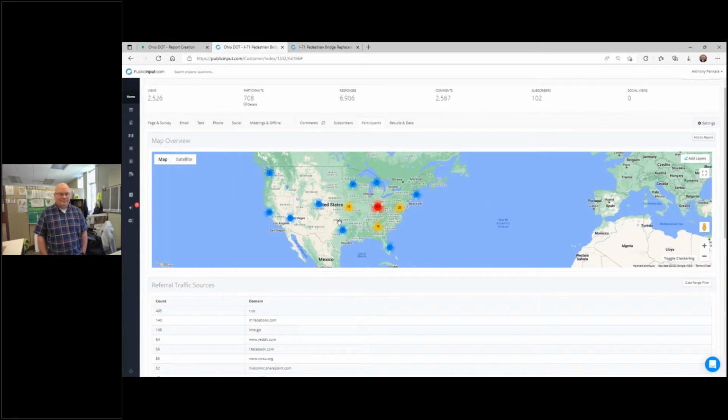Another question, did you provide an opportunity for people to ask questions, and how did you answer those questions? So some of them we answered on the spot directly because that's what public input allows us. If it was a question that was really concerning and needed to be addressed right away, I didn't want them to wait the full 30 days, so I can just answer right then and there. Other ones that are not as critical, I let those collect so that we can find a summary of what the question is, like aesthetics. There's a lot of unique questions, but they are all based around aesthetics.